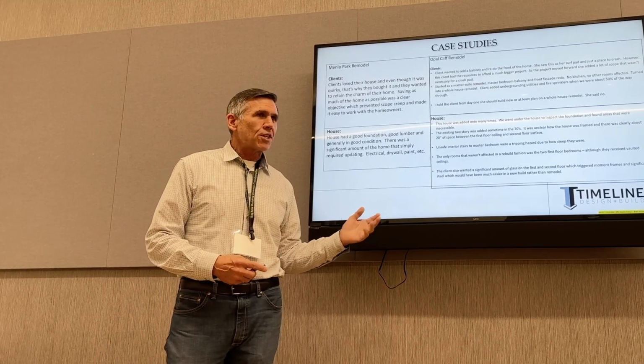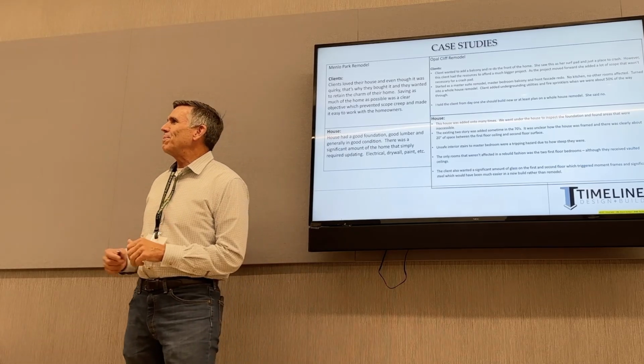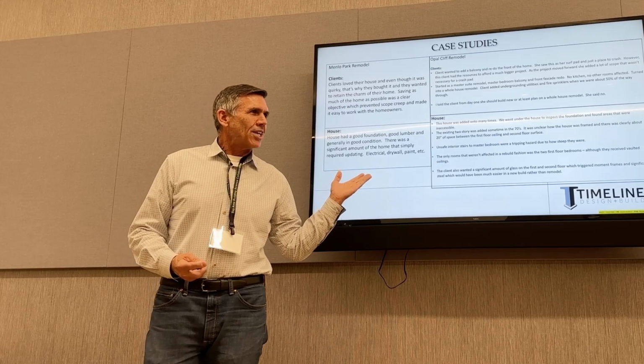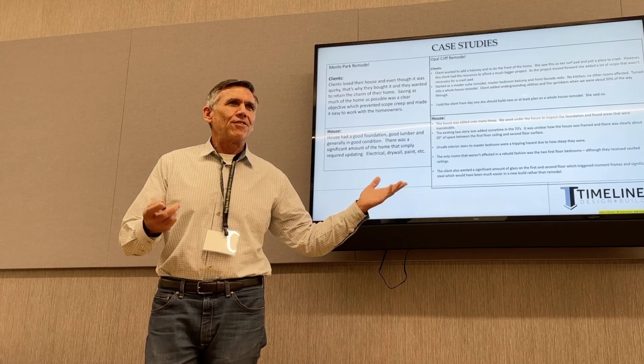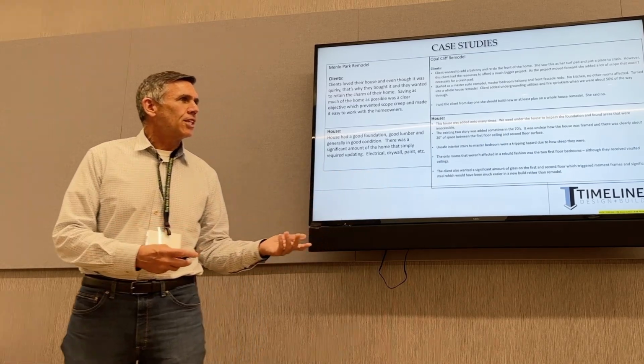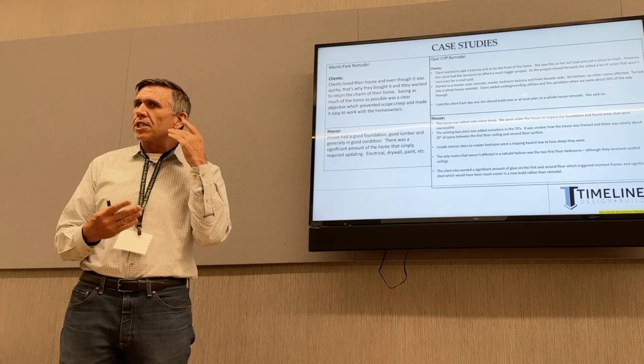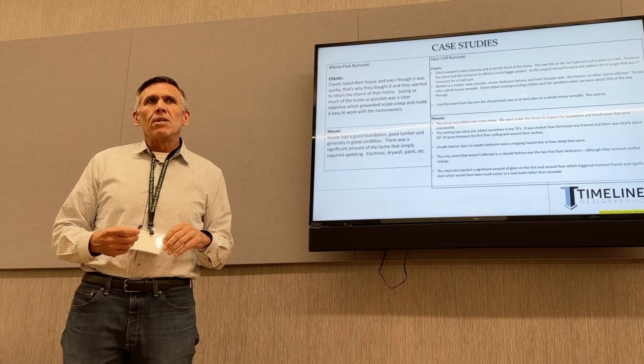About 60% of the way through the project they said, let's underground PG&E. Well, PG&E is like, I've got a 9-month project and now I have a 15-month PG&E project thrown in the middle of that. So these are the kind of things that we went through on a house that really should have been a new home.